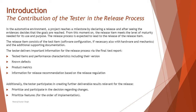In the automotive environment, a project reaches a milestone by declaring a release and, after seeing the evidences, decides whether the goals are reached or not. This generally happens in other projects as an exit criteria. Exit criteria and coverage measurements will tell you if the project can be pushed for release or not.